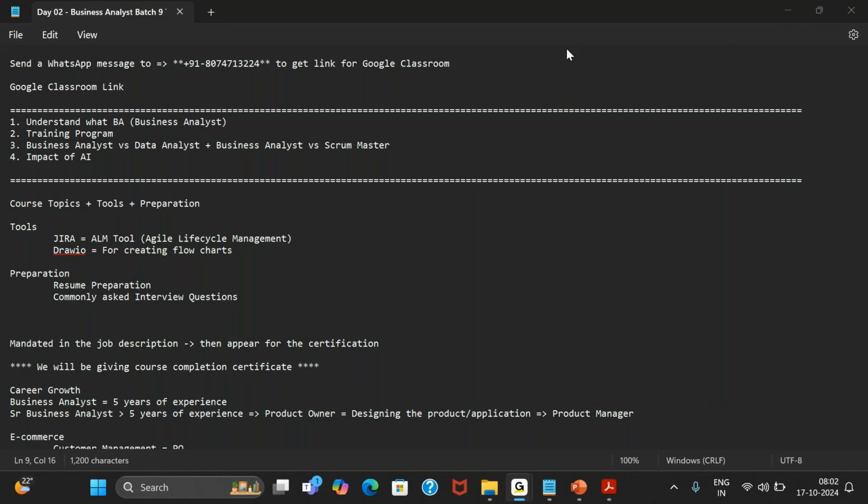Okay, so being proactive alone will help you a lot. Whenever we go for stakeholder updates, if it's negative news, we always go with an action plan: why it was delayed and what we are doing in order to bring it on track. Despite our action, if we can't bring it on track, then what is our plan B?